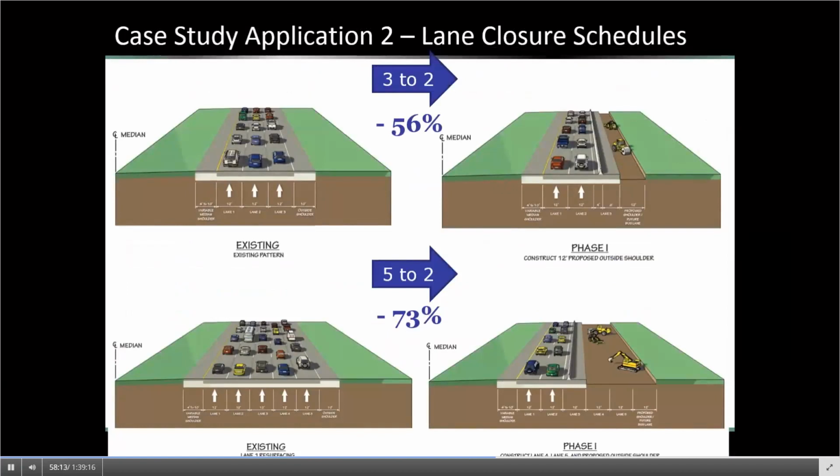You notice that the net capacity reductions shown below are much more than just the loss of the single lane. And that's because through the NCHRP research, we know that due to the friction effect and the turbulence, the work zone really has a per-lane reduction in capacity even for the open lanes, so that taking 1 lane away from the 3-lane freeway can reduce capacity by over 50%.